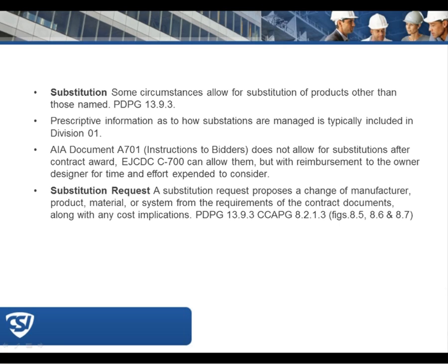The tricky thing is that you almost never get an initial substitution request to the contractor. It's always an "or equal." Have to clarify that this is not an or equal if the substitute additional information is required. And in the end, it goes to having the design professional understand the reason for their design intent as it's shown in the contract documents, and being able to confidently address whether or not a substitute will meet the intent of that design.